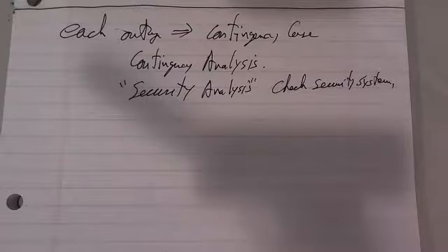Contingency analysis is the kind of thing that technically you ought to do for any business that you're in. You ought to say, well, what's going to happen to my business if the delivery of new parts is delayed by 3 weeks? What, am I going to go out of business? If so, maybe I ought to have a stockpile, and so you have to try to optimize the amount that you have in stockpile.